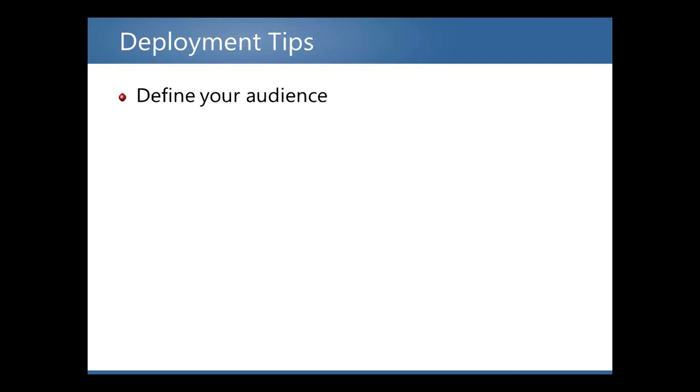Before you begin working with your stakeholders on defining your maturity and your requirements, ensure that they understand the next steps as well as the right audience needed to avoid future holes. Don't take for granted that your audience understands the full extent of what will be discussed in the workshop. Without a high-level overview of the questions that will be asked, they won't be able to appropriately define the right attendees to result in requirements that will meet the needs of every user. Always send the question overview topics first. Those who are needed to answer the questions are required in the session for a successful plan delivery.